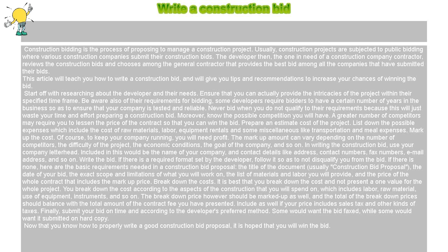Prepare an estimate cost of the project. List down the possible expenses which include the cost of raw materials, labor, equipment rentals, and some miscellaneous like transportation and meal expenses. Mark up the cost.